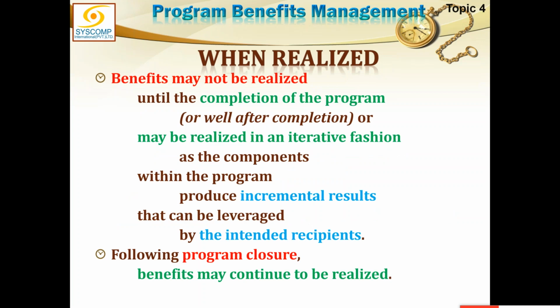Benefits may not be realized until the completion of the program. That is one way of looking at it, that we are getting into this program for a specific purpose of delivering a consolidated benefit at the end. If it is a consolidated benefit case, then benefits may not be realized until the whole of the program has finished, or sometimes it can be well after the completion. But this is just written in brackets because this is not always the case. The intended benefit generally gets delivered at the end of the program.